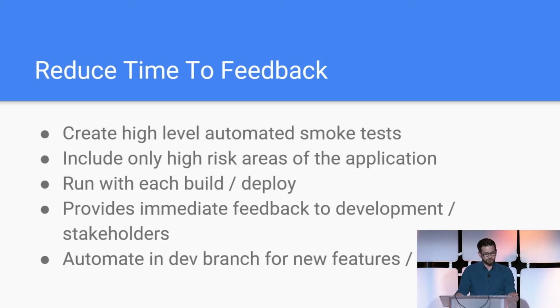or impacting your business. And also, like I said, for our point of sale release, what we did was we were automating alongside development. As soon as they finished a new part or new feature for the next release, we would start automating tests on it. So day one in the test environment, we're running a full set of tests that have been developed alongside the features that are going into the application. And so by being able to do all this, you catch bugs earlier, you get feedback to your developers earlier, you get feedback to your stakeholders and project managers earlier. And the more you can do that, the faster you can do that, the better, because there's less risk of bugs getting through your testing process later on.